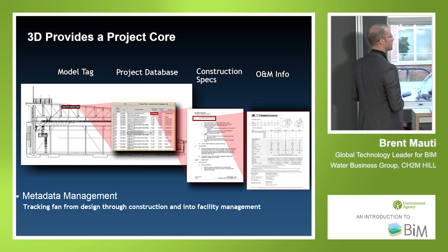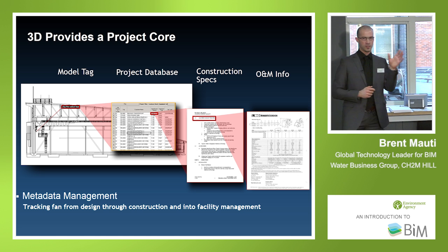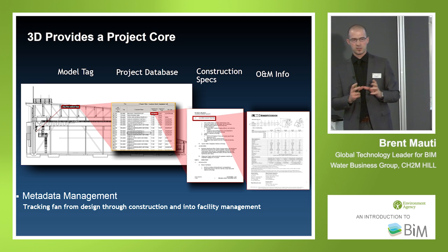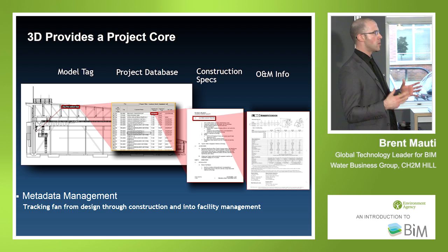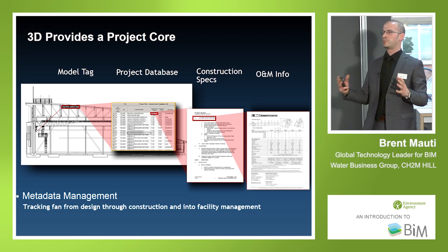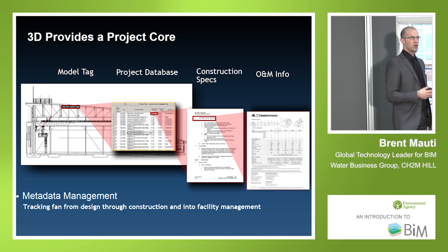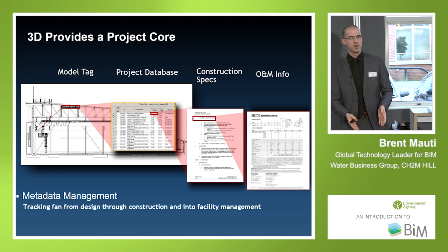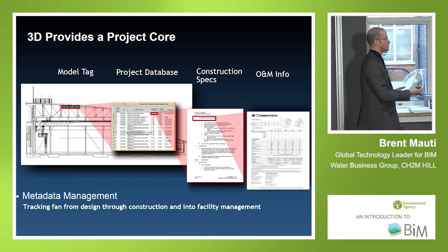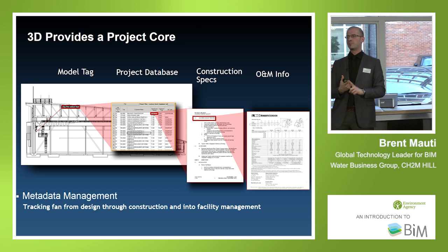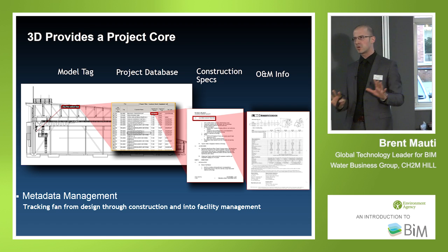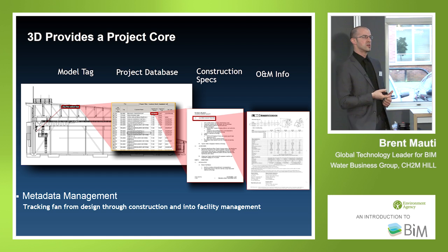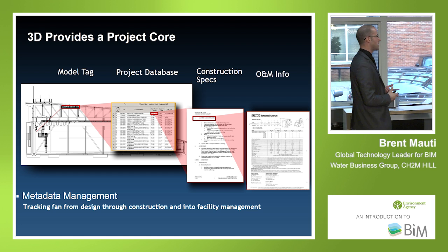So we were able to achieve it, and conceptually then we stood back and said, well, why are we doing this? So this is a little graphic that I've used for years where it's helping me to express the concept of an asset of importance. So when we're modeling spaces, modeling buildings, modeling plants, modeling civil infrastructure, not all the assets are important. So when I look at a building, and I'll put my architect hat on for one second, the carpet might not be important, but the structural columns may be, or the windows or the doors. So the same here, we'll look at valves and pumps and pipes, but not everything around those is important. Once we have the definition, this comes back to the EIRs. Define the asset of importance, define the required information, figure out how to harness that.